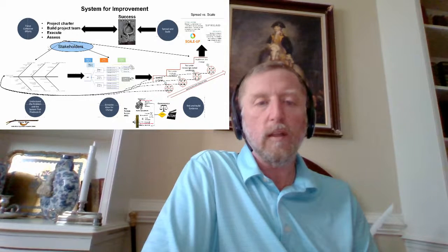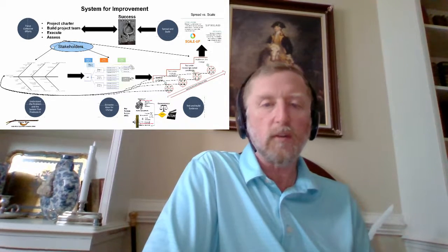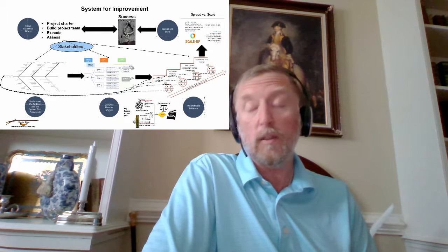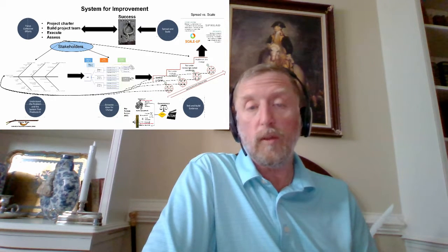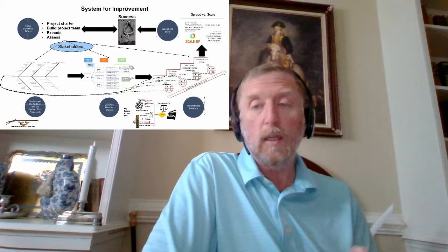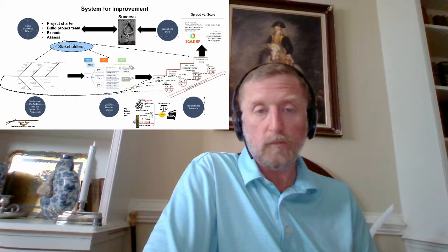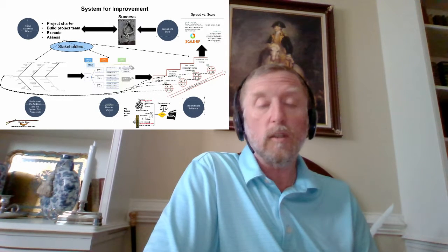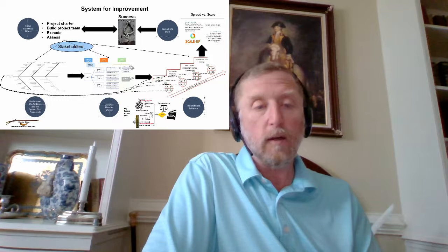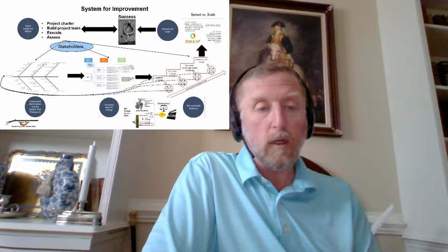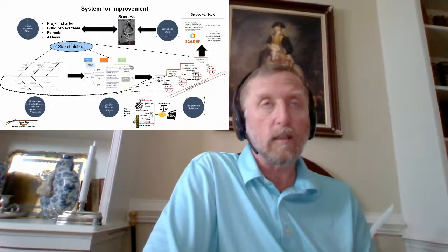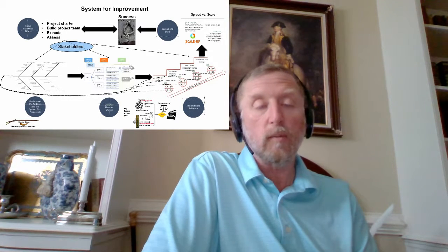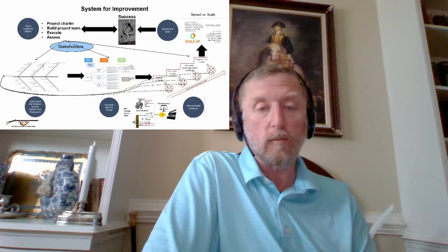We've then got to identify and understand who those stakeholders are, because the stakeholders are going to provide the constraints and limitations that are placed upon how we can do the project, as well as the resources in terms of both people and funding and systems. Stakeholders can be internal and external. There could be external stakeholders that are driving root causes on that fishbone that we can't address because they're external stakeholders, and we may have to go back to the chartering body and have them address it.